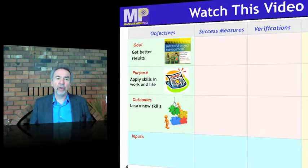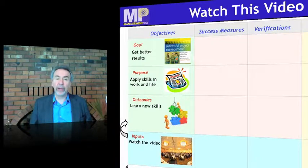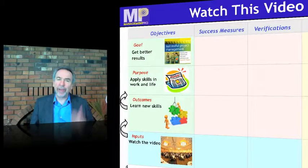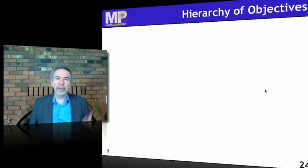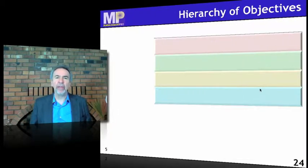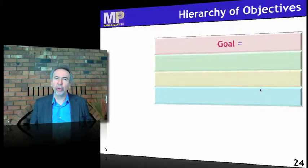How are you going to learn those outcomes? Well, you're going to watch the video. So we have a four-level relationship that says: if we do these inputs — watch the video — then we can learn new skills. If we learn new skills, you can apply them. If you apply them, you will get better results. Let's give some definitions of these levels of objectives, because it's very important in distinguishing cause-effect relationships in your strategy or your project.